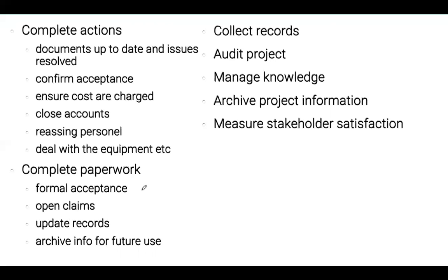You complete the paperwork, so you get it on paper saying that the product is approved. You deal with open claims, you update the records on the project and the company data banks. You archive information for future use, because obviously it's nice if we can refer to past reports so that we don't make the same mistakes and have things a little bit easier.